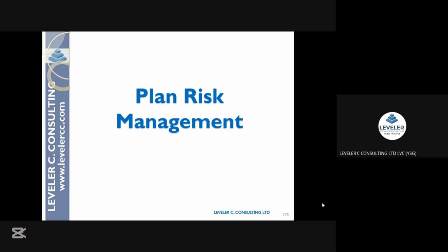Why you handle the strategy. Another thing you want to look at is budgeting. Who is responsible for allocating funds for risk management activity? You need a contingency reserve. Another thing you want to look at is timing. Define when and how often you will perform risk assessments. Maybe every Monday after the meeting, we will do a risk assessment. Then we'll check where the risks come from.